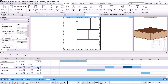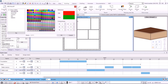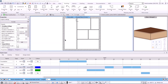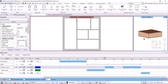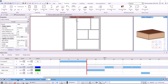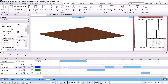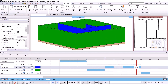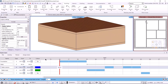The next option is to add colors to a given activity. I set green color for the exterior walls, so these walls will appear in green on the animation. Let's set blue color for the interior walls. Let's check out the animation. The animation will appear in the 3D view in the perspective we set, so it's worth choosing an angle that we would like to see the animation from. What we still need to set is the animation line and the date display on the animation bar. We can determine how long the animation should be — 10 seconds seems perfect for now. I activate the 3D window and start the animation with the play button. We can see that the outer walls appear in green and the inner walls in blue. There was a one-day break which caused the work to stall, and only then did the rest of the walls appear. Finally, we completed the roof as well.